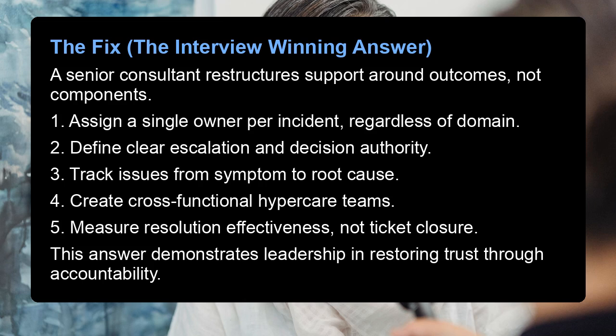The fix, the interview-winning answer. A senior consultant restructures support around outcomes, not components. 1. Assign a single owner per incident regardless of domain. 2. Define clear escalation and decision authority. 3. Track issues from symptom to root cause. 4. Create cross-functional hypercare teams. 5. Measure resolution effectiveness, not ticket closure.